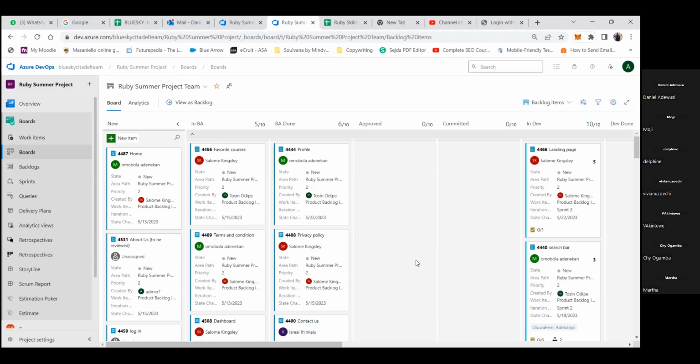I started yesterday, but I finished today. I used 6 hours yesterday, and the remaining 2 hours to finish up I used today. That's what you're doing when splitting the story and dividing your estimates, your efforts, sorry, or story points across the story: what has been used already, and what is remaining that I'm committing to do today.